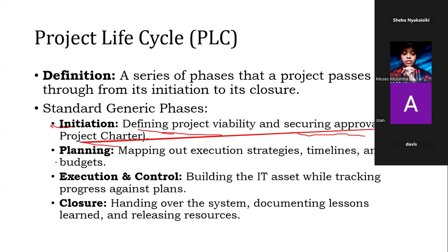That's the first stage. The second is planning, mapping out execution strategies. You're saying from this time to this time, we're going to do this. From this time to this time, we're going to do this. While we're going to do this, we're going to talk to management, we're going to talk to the users or the stakeholders. When we're going to this stage, we must ensure we have secured the funds. So that is planning. The third stage is the execution.